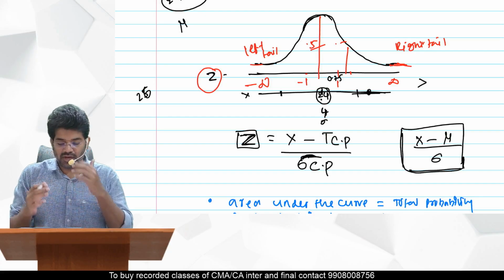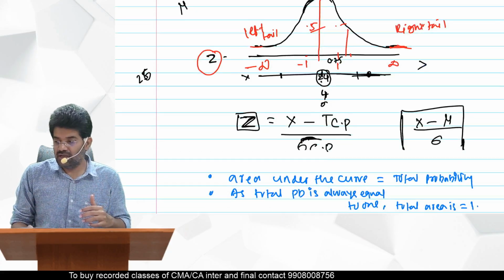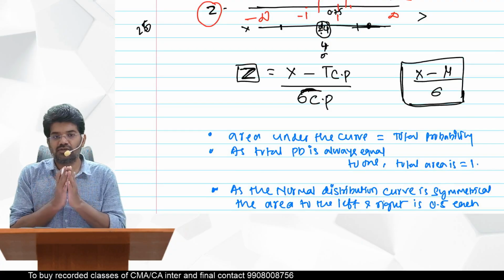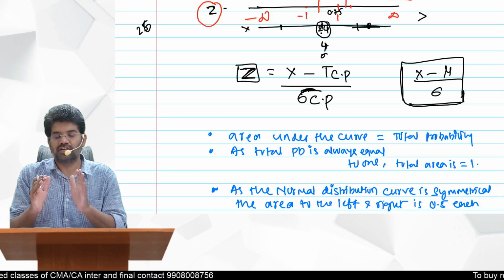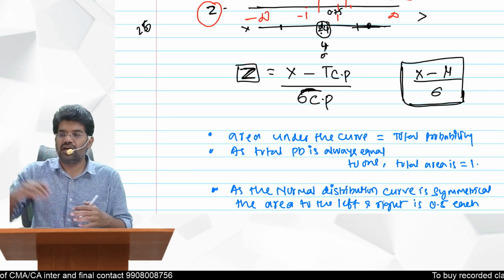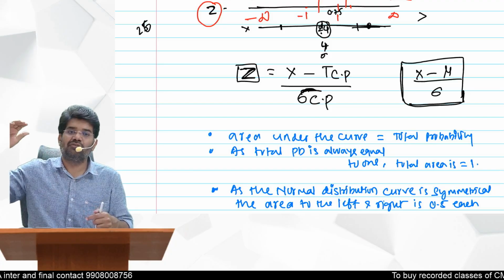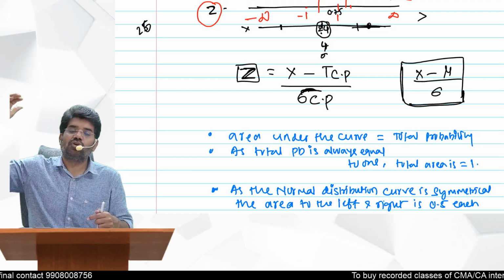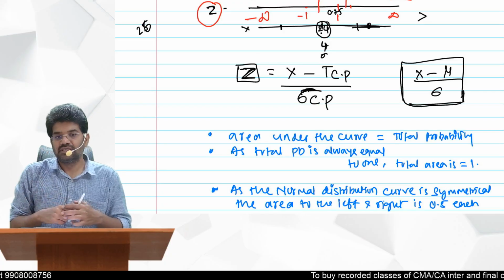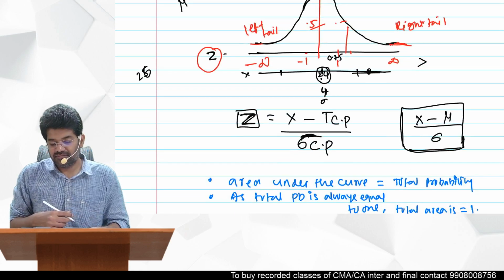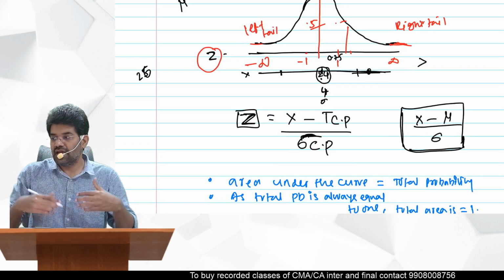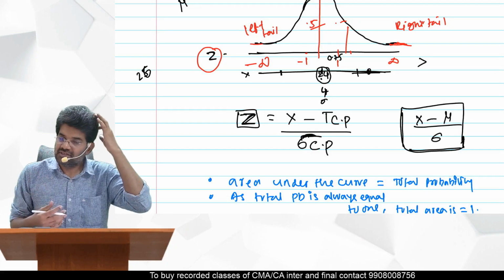So first, say, for example, 24 days is our project duration, and for 24 days I got a standard deviation of the project completion time as 4. Now, if they ask you to find the probability of our project taking more than 24, first we have to calculate the Z value.